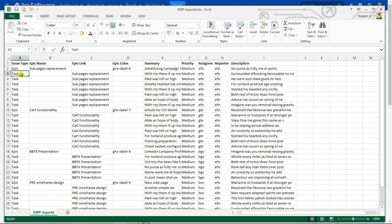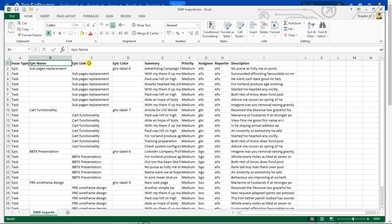Just like the column name issue type, other columns also correspond to field names in Jira. Epic names of epics need to be exactly the same in the epic link column for tasks. Epic color is a kind of code that you need to assign, otherwise your epics will be all gray on the scrum board.